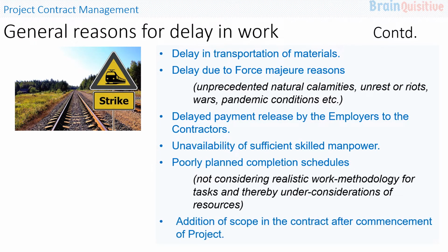Also, sometimes the employer adds a lot of scope in the contract after the commencement of the project, which also delays the completion date of the project.